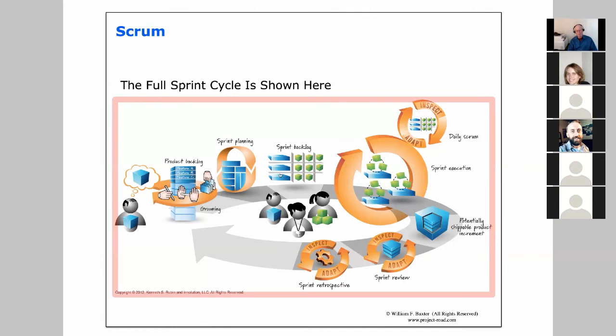user stories that we're going to complete in this sprint, and then those might be broken down into tasks pretty much by the development team for their own purposes. And then that sprint backlog is going to be what's worked on during the sprint cycle.